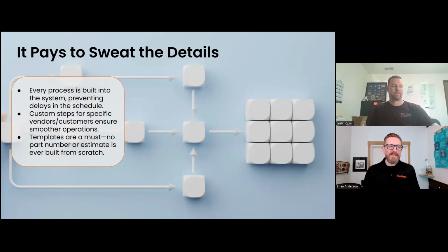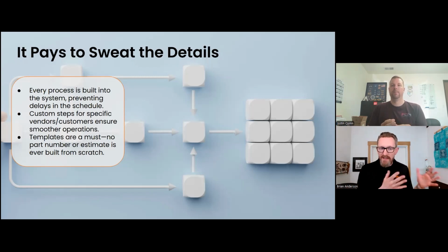Yeah, I love this example because it really highlights that a lot of the people in their process, they build in the check, but they build it into the wrong spot. In your case, it was built in at the end, final inspection. You did catch it before it goes to the customer, which is definitely good. You don't want to send it to the customer and have them find it. But you realized right away, hey, we checked this, but we checked it in the wrong spot. So you took action, you corrected the immediate problem, working with your customer to come to a resolution, and then you addressed your process.